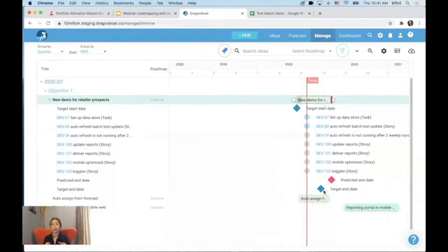So we have two choices. One is to move things around in Jira just so that this one can make it on time. The second one is, we can't change it anymore. Our team is full. They have all the things we need to work on. Therefore, we need to change our delivery date, right? So we can update the date and inform our stakeholders, right?